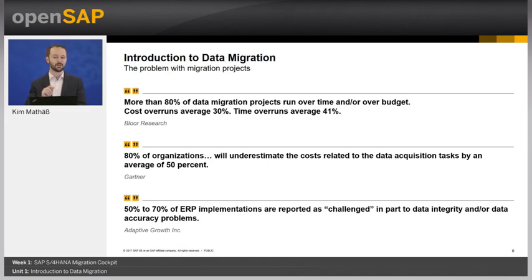This is something where you would like to test your migration several times. Also, talking about timeline, you would like to start your migration activities early so that you can test early and even fail early. You want to see data issues very, very soon in the project, so that you never endanger go-live dates due to data migration issues. That should really never happen. You want it as easy as possible.